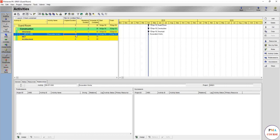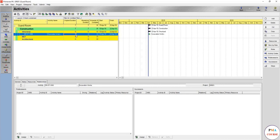Let's say we're going to make it excavation for the guard room. You have one backhoe, you cannot make more than one backhoe for example. Let's say we are going to give it five days, five days or six days. Six. Here when you write six days, it's six working days. Be aware it's not six calendar days. So now that's fine, you got this.